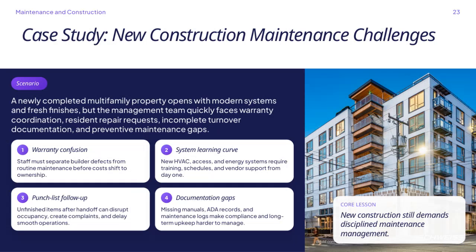Here we have a scenario that highlights some common challenges faced when managing a newly completed multifamily property. Even though the property opens with modern systems and fresh finishes, the management team quickly encounters several hurdles. First, there's warranty confusion. The staff needs to clearly distinguish between builder defects, which should be covered under warranty, and routine maintenance tasks.